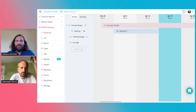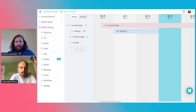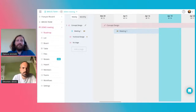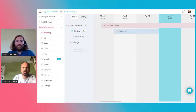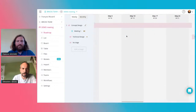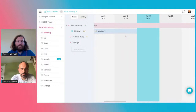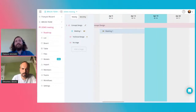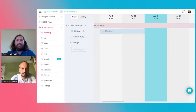The agile approach is based on iteration. When you have a stage like this lasting two months, you have to cut it into smaller parts of time. The name for this part of time is a sprint. You create sprints that are always the same duration — normally one to three weeks — and you cut your entire stage into these sprints. So I'll create meetings for this stage — what is a 'meeting' is in fact an iteration in agile.